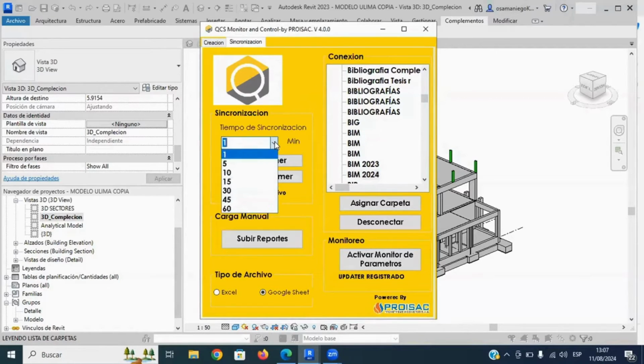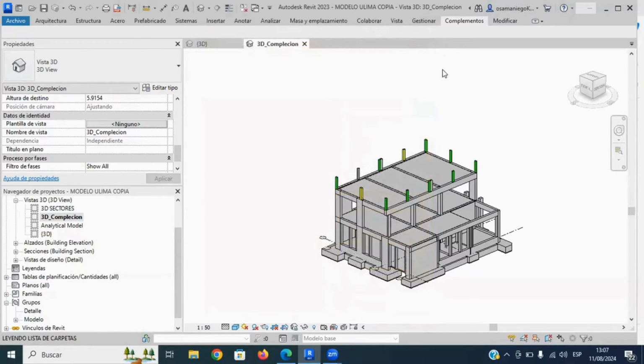As previously explained, the application generates a database within this folder, and any change in the state of a deliverable in the BIM model is recorded in the synchronized database. For illustration, consider a BIM model where each BIM element is assigned a unique ID. Every BIM element is a deliverable to be completed, meaning that all its technical requirements, for example, concrete strength, have been complied with. In this sense, achieving quantities such as the amount of concrete cubic meters does not necessarily mean completing the elements related to that concrete amount.